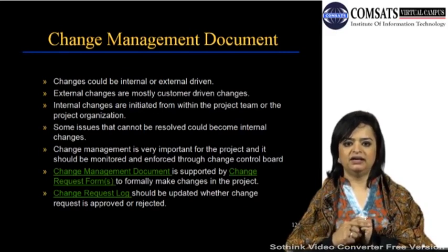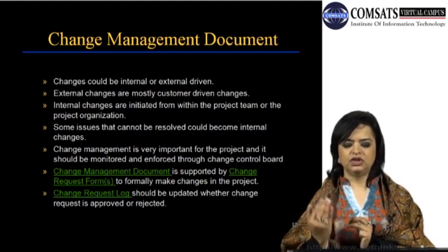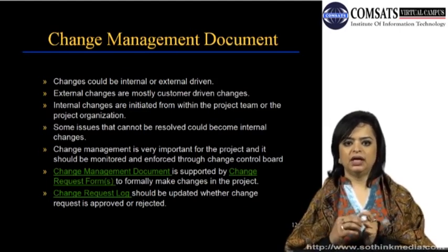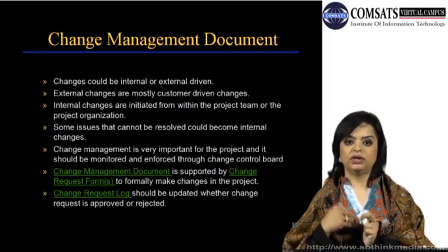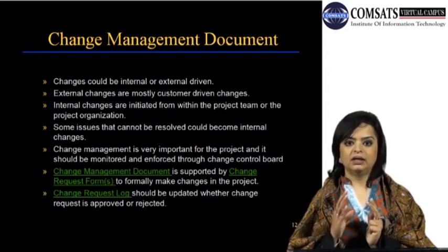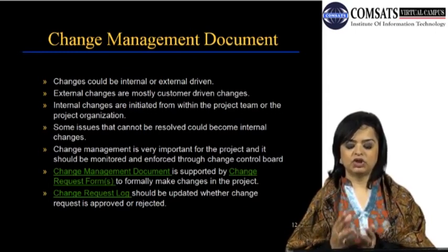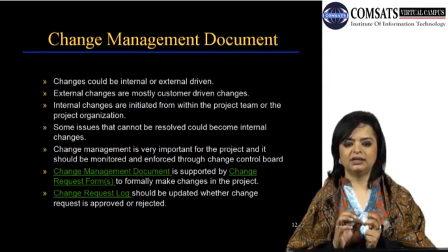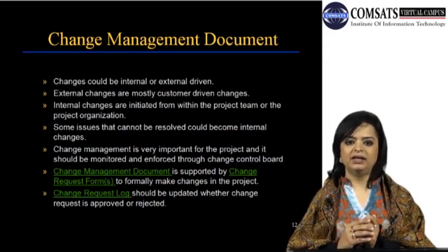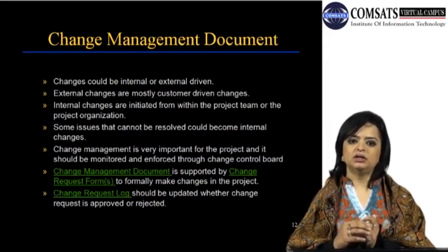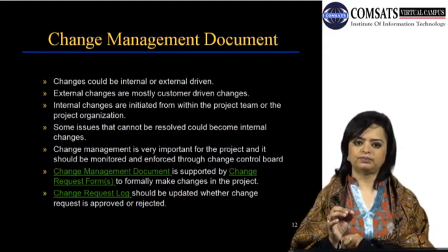And to simplify our lives, in the initial phase of project management, any change that will affect the triple constraints of the project should go into another document which will contain much more detailed information, by the technical lead, by the technical analyst, support, everybody pitching in, signing off, and ready to be taken to the change control board.